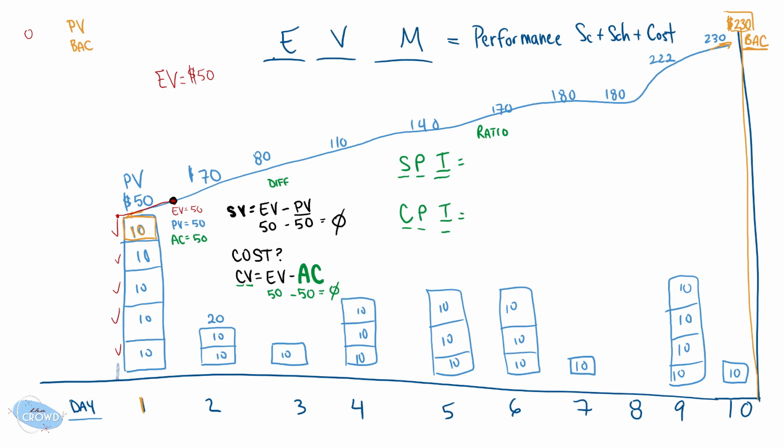And then, if you can guess, we're going to use the same values. So for the schedule, we're still going to use our earned value, because that's here. And for our costs, we're still going to use our earned value. But instead of subtracting, as we've done here in our different variances, we are going to divide. So the same type of information is going to be extracted, but we're going to get a ratio. So this one is just like we had here, but now planned value is divided by, and this one we had actual costs.